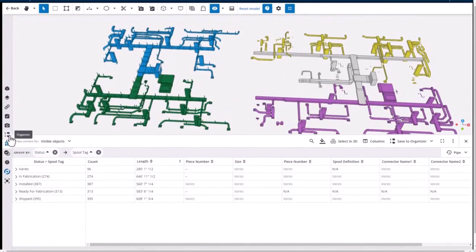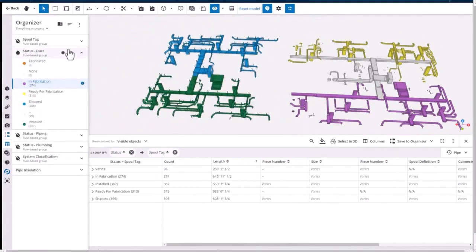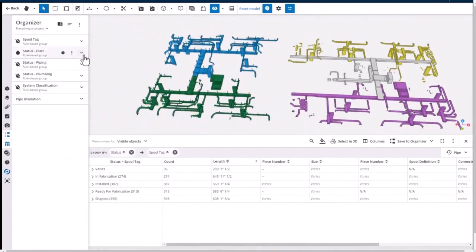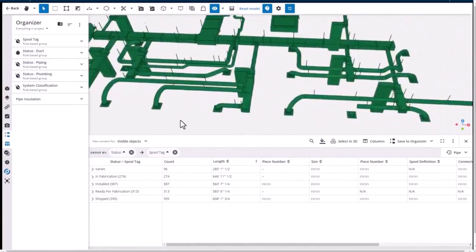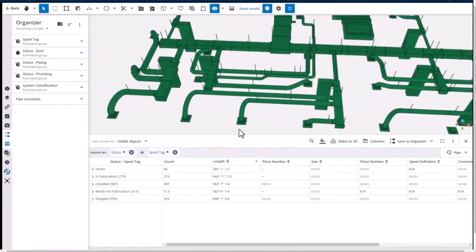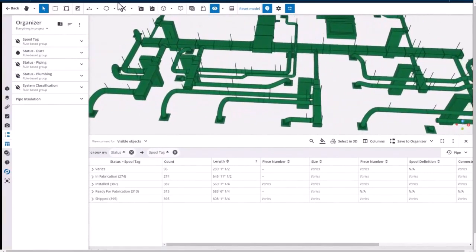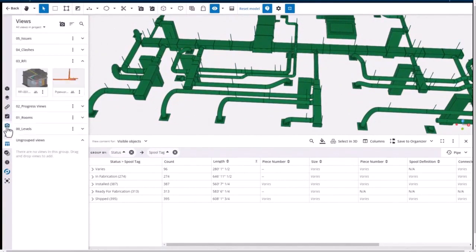So kind of moving along the same status realm here, aside from some of the data, how can we incorporate that back on the ProjectSight side? So once we status things, say that the foreman comes in, he statuses this as installed at the end of the day. He can then save that view with this area that we've got installed. And now again, I can save that view and tie it to my daily report on ProjectSight.